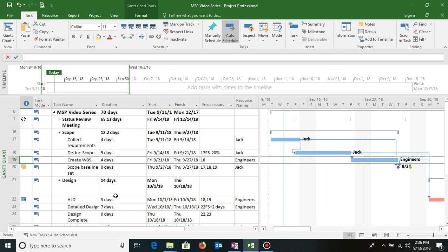So let us first understand how you review and how you format various views. Let us take an example: suppose your leadership team's requirement is that they need basic dashboards of the various milestones along with the dates on which you are planning to achieve them. One of the best ways to share that is a timeline view. The timeline view is the view which you see at the top of your Gantt chart.